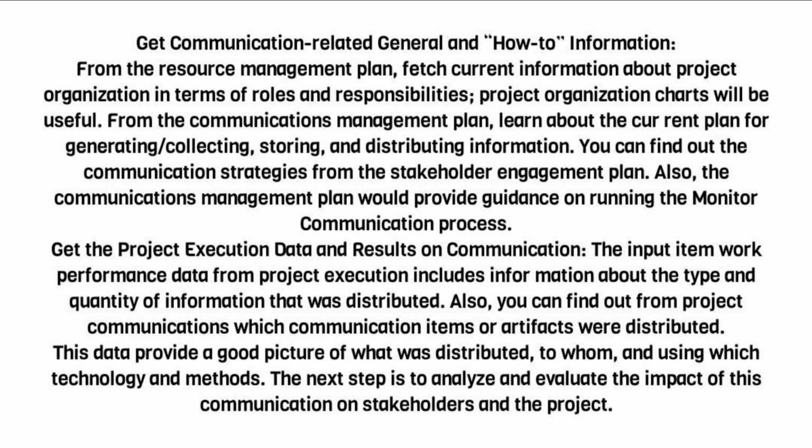Get the project execution data and results on communication. The input item work performance data from project execution includes information about the type and quantity of information that was distributed. Also, you can find out from project communications which communication items or artifacts were distributed. This data provides a good picture of what was distributed, to whom, and using which technology and methods. The next step is to analyze and evaluate the impact of this communication on stakeholders and the project.